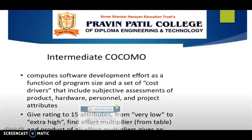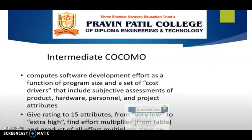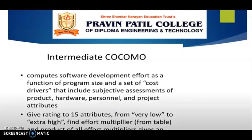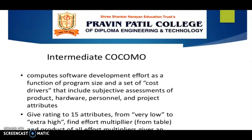The intermediate COCOMO model is an extension of the basic COCOMO model. This estimation model makes use of a set of cost driver attributes to compute the cost of software. It computes software development effort as a function of program size and a set of cost drivers, including subjective assessment of product, hardware, personnel, and project attributes. New ratings for 15 attributes range from very low to extremely high to find the effort adjustment factor.